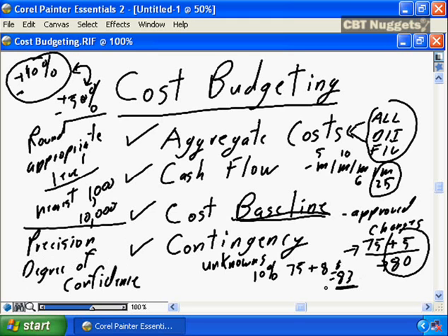Yes, I'm telling you my project is going to be $83,000, but that's plus or minus 50%. I'm not far enough into the project to be able to definitively tell you that the project is going to be $83,000. Every piece of information I have at hand right now tells me it's going to be $83,000, but there's a degree of confidence. I need more information. I need to be farther into my project to allow me to deliver a definitive statement for the project budget.